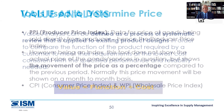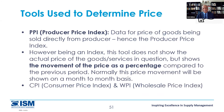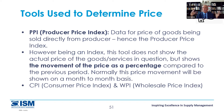Tools to determine price: producer price index (PPI) and consumer price index (CPI) — with inflation running around 7–8%, that also affects cost. CPI and PPI help compare: if a supplier's producer price two years back was X and today is Y, you get the PPI trend. Wholesale price index (WPI) changes are also available. In India, trends are available for many items. For common user items — furniture, air conditioners — you can easily find PPI and WPI. CPI can be used for every place, but not for specialized CapEx items.